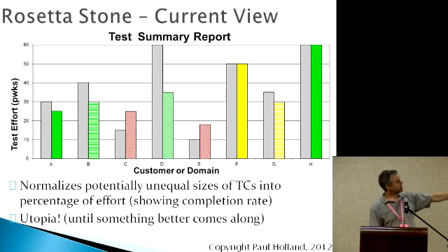So what I can look at on this week's plan is that I have 5 extra person weeks of effort that I can move across. The total of the gray lines pretty much is my plan to the release date. So if I have 10 testers and 10 weeks, then I'd have 100 person weeks of effort that it should add up to. That's about it.